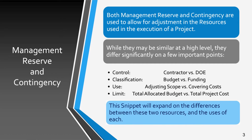MR is controlled by the contractor, while contingency is controlled by DOE. MR is considered an element of the contractor's budget, while contingency is a source for funding by DOE. MR is primarily used to adjust scope at the control account level within a contract, without any changes in the contract-level scope, while contingency is used by the DOE to cover project cost overruns and fund contractual changes within the performance baseline, or PB, scope, schedule, and cost.